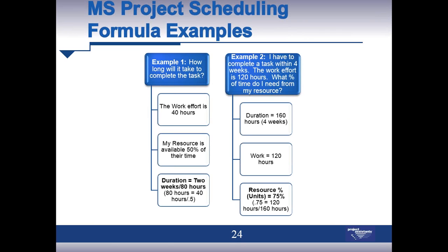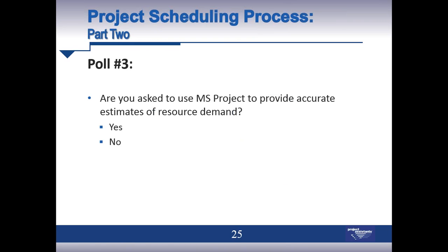If we took 75% and we looked at the daily usage scale, what would we see? Right, so we see the 6 hours, right? 75% of an 8-hour day. Exactly. Assuming we have an 8-hour day set up in the default, right? Yeah. Well, it goes right to the calendar, right? If you're out half a day, it's going to take 3/4 of a half a day and schedule you for 3 hours, right? And some organizations, their folks maybe are only available a 7-hour day or 7.5-hour day. So you should make that adjustment as the default. All that is critical as you schedule your plan.